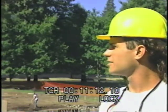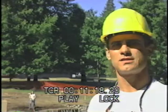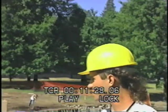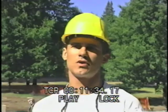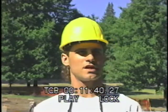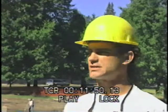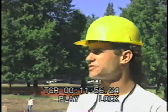The students were looking at where we can get the type of lumber that would be able to be used in an exposed location like this. They were calling suppliers of bolts and washers and things like that. They were calling people that rent out the augers that we were planning on using to drill the supports for the concrete piers. Those people were saying, we don't rent something that goes down more than 5 feet. So we had to make design decisions based on what kinds of equipment we would have available to us. Placing the orders and juggling what's going to get out here when are things that I'm doing, but I try to pass it off to students wherever I can.